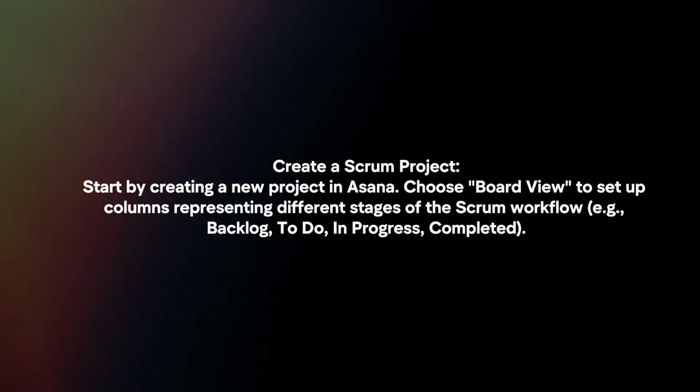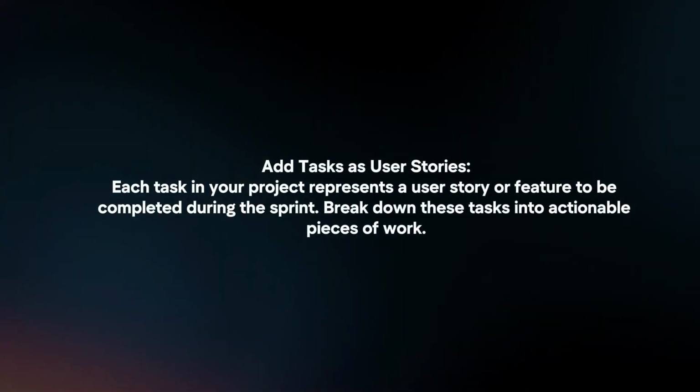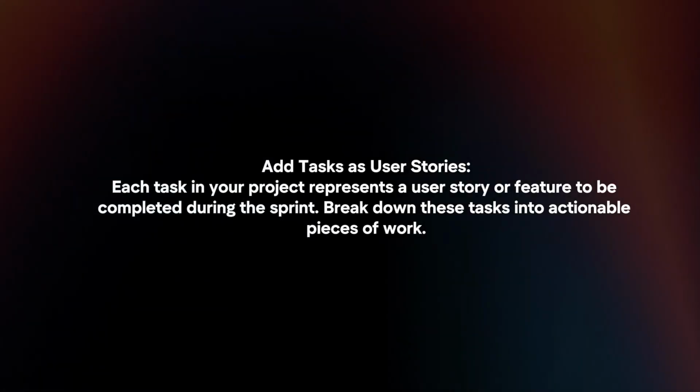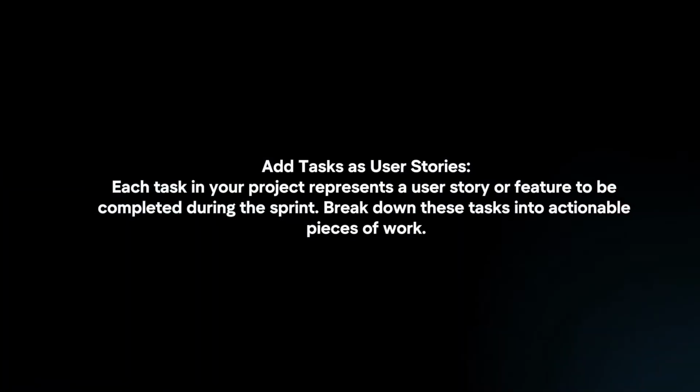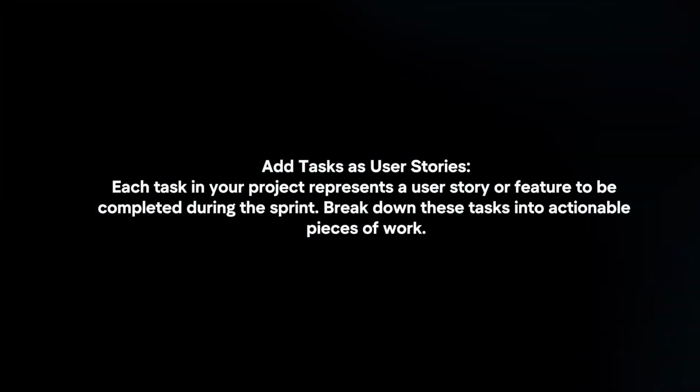Choose Board View to set up columns representing different stages of the Scrum workflow. Add tasks as user stories. Each task in your project represents a user story or feature to be completed during the sprint. Break down these tasks into actionable pieces of work.